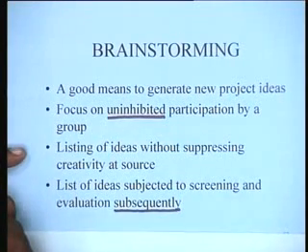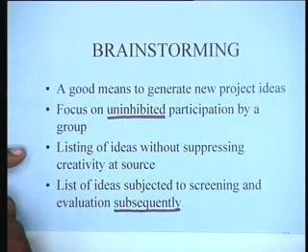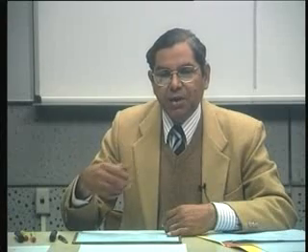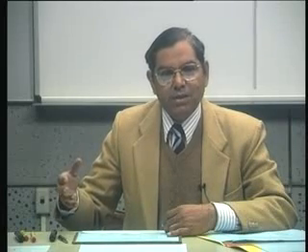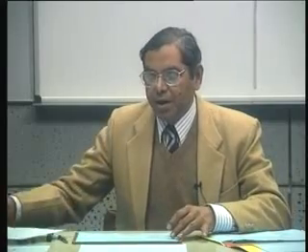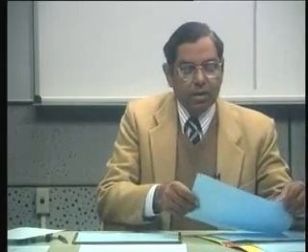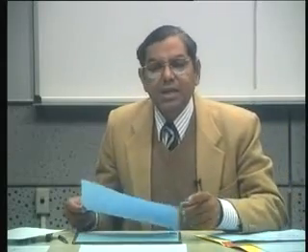So what we do is we basically generate a group of ideas in which normally the members participate together, and each member would give some idea which is recorded. Once you have a sufficiently long list, at that stage you can suspend this process and then go to evaluation or to screening, right? That would be the general way of looking at the brainstorming exercise. So let me just mention how screening is done.